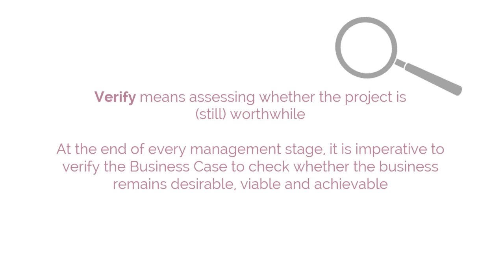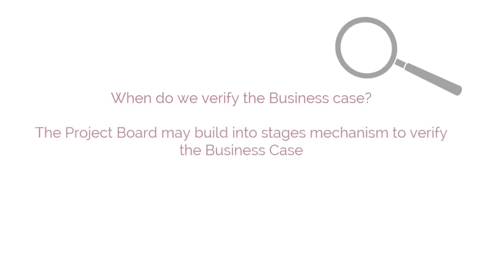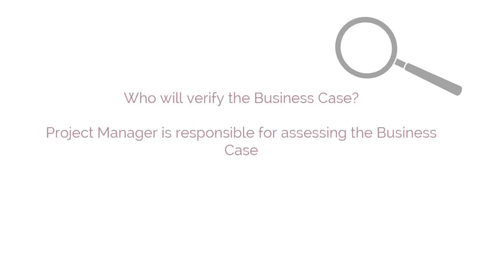But should we only verify a business case at the end of a stage? Should we wait until the end of a stage? For example, a stage may last for 10 weeks, or 10 months in a very large project. So the answer is no. The project board may build into stages a mechanism to verify the business case. So whenever a milestone is achieved, you can verify the business case. Whenever there is an issue that is affecting the project in a significant way, then the business case must be verified.